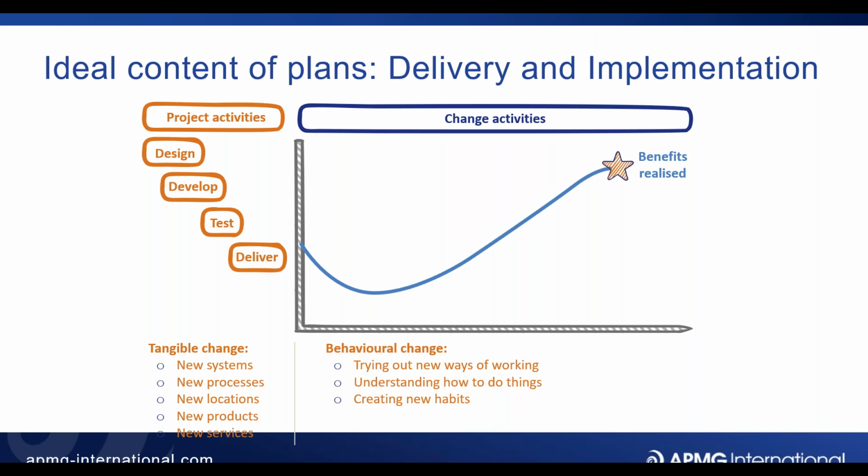What I see in Agile worlds all the time is that the technical, tangible work goes much faster, and we end up with a backlog, not the product backlog that we talk about in Agile, but a real backlog of achievements that we've got that haven't gone into use yet, because people are still trying to process emotionally and psychologically their new way of working from the last few changes that we implemented. So I do think in our plans, we've always got to keep an eye out for how much of this we can keep in sync, so we don't end up having lots of things that people aren't using yet because they're not ready to use them. So we need to work on bringing those two worlds together.